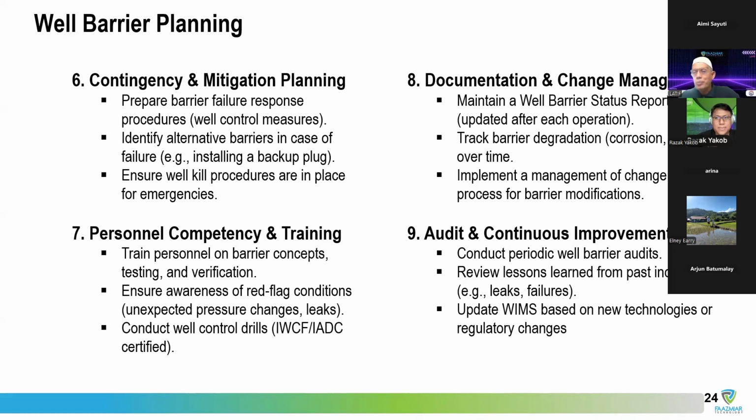So the communication, the documentation and change management are always the same thing, like to apply whatever changes in your original plan, MOC will be used, because MOC will be used to really make sure it's all been done properly. You have completed your risk assessment, you have your contingency plan, then the approval will come in to implement the MOC. And then for audit, of course, they have to do periodic checks on your audits. That's why WIMS will help a lot in terms of keeping the updates up to date.